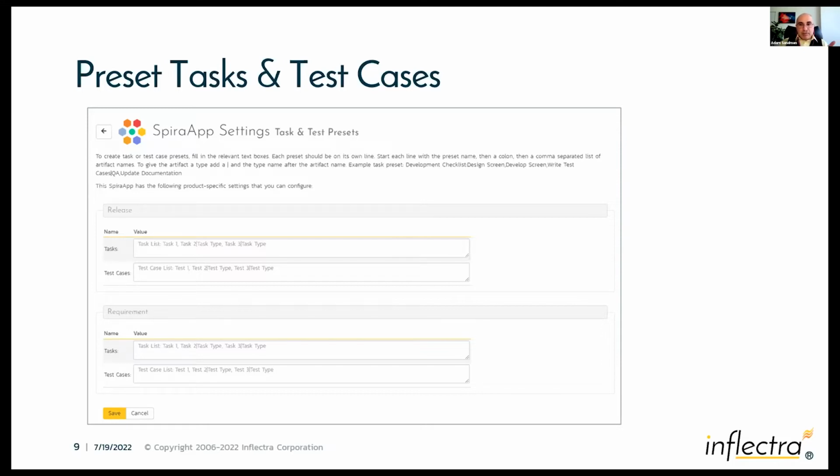You have what are called steps to doneness, which is a horrible word, doneness. It's not necessarily a real word, but steps to doneness. If you've ever gone through a project, you will document as a team your steps to doneness, which might be design the module, write the code, do a code review, do some integration testing, unit testing, do performance test, security test. Might include deployment staging, maybe a third-party stakeholder review, whatever it is.